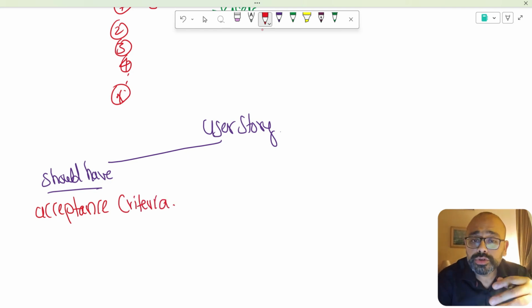That is how this particular user story will be accepted by the customer, the acceptance criteria, and it should be agreed as early as possible on the project, so that when you start doing the work, your vision, your goal, and the team's understanding of how it will be considered acceptable is clear first. So every user story will have an acceptance criteria.